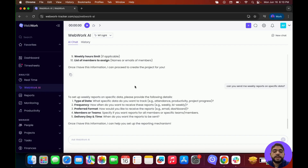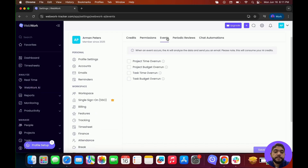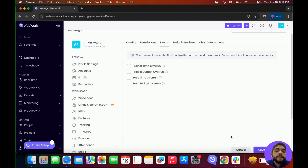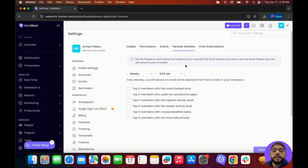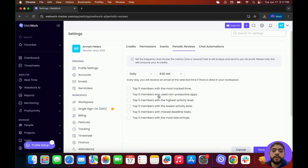You can also configure the AI to send you reports based on specific events or triggers. Go to Settings, then down to WebWork AI, and into Events. Here you can choose specific events — for example, project time and budget overrun or task time and budget overrun. Once the time or budget is exceeded, you'll get an email with the AI analysis identifying where the most time or budget was spent, along with helpful insights. In Periodic Reviews, you can set a frequency — daily or weekly — and choose the metrics the AI will analyze and send to you via email, such as top five members with the most tracked time, non-productive apps, highest and lowest activity levels, missed deadline tasks, and most late arrivals.